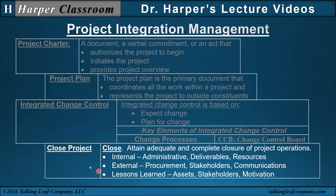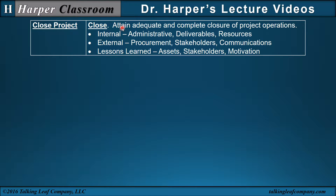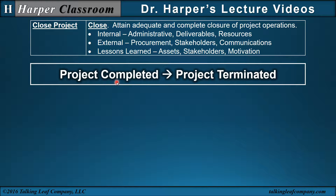Let's look at the process Close Project. Close Project attains adequate and complete closure of project operations, which includes internal, external, and the important — and sometimes overlooked — lessons learned. It's important to emphasize the difference between project completed and project terminated. Often a project is deemed completed, but it is not terminated if portions of the internal, external, and lessons learned are left undone. The process of Close Project refers to the complete termination of a project, not just a partial termination where deliverables are completed but internal, external, and lessons learned have not been totally finalized.